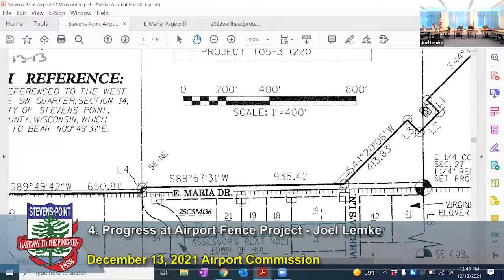I can. Like I said earlier, while we were going through the update, the clearing will be done this week for the whole project, the entire perimeter of the airport. It's kind of a weird balance of authority on these projects, as people have discovered as we go through them. As the sponsor, we have a lot of influence and participation in design and project, but the contractor is actually working for the state here, not for us. They bid the project, they award the project, they manage the project. We're just the local sponsor, or grantee, as they refer to it, if you're talking in terms of real estate.